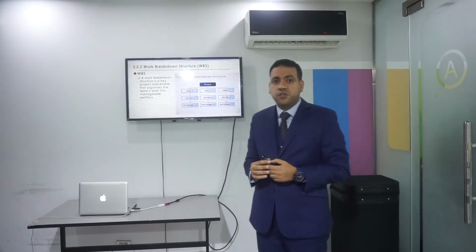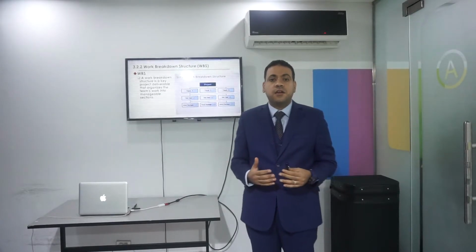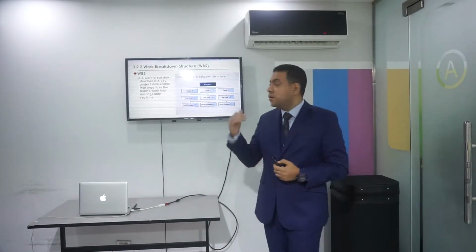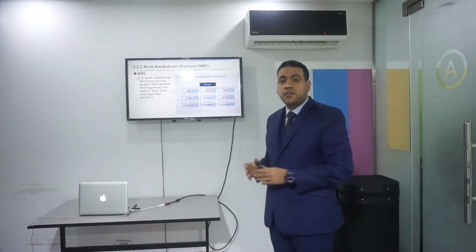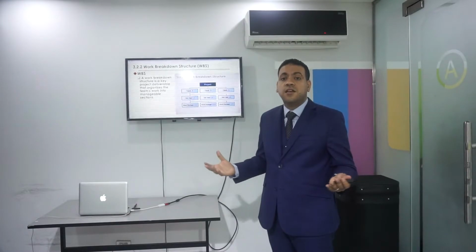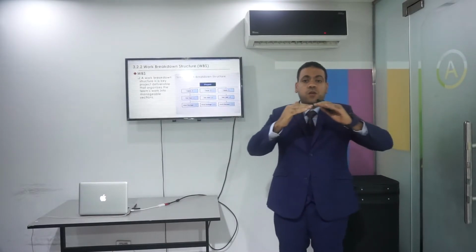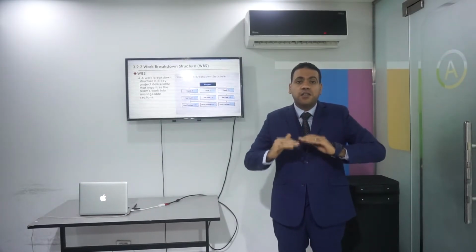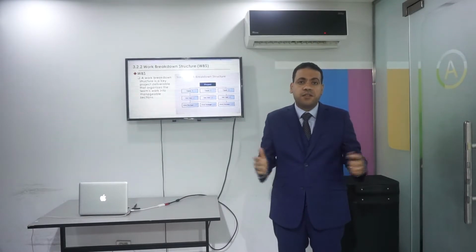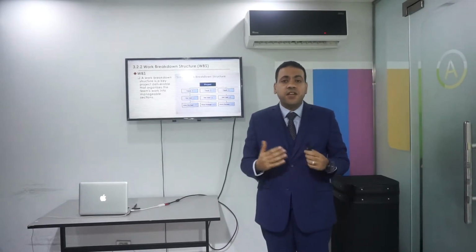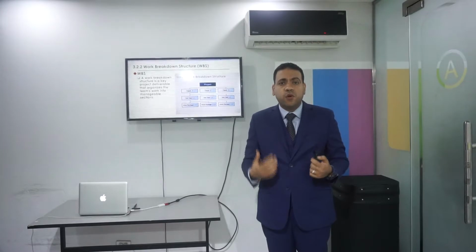The work breakdown structure, or WBS, you are going to decompose the whole project into management activities. For example, you can see in this figure that the project is broken down into some tasks: task 1, 2, and 3. Task 1 is also composed of other smaller tasks, like subtask 1, 2, and 3. Now, subtask 1 is going to be composed of work packages, which is the smallest part in the WBS. And you cannot decompose the work package into smaller activities. So the WBS is very important for you in order to handle projects by breaking them down into small activities.